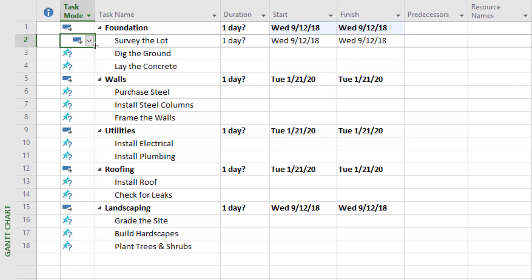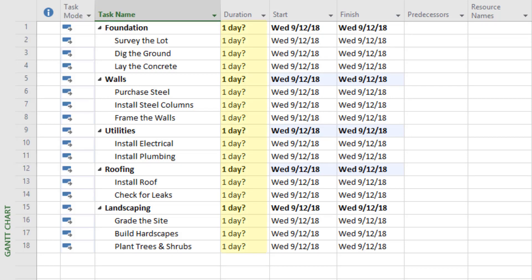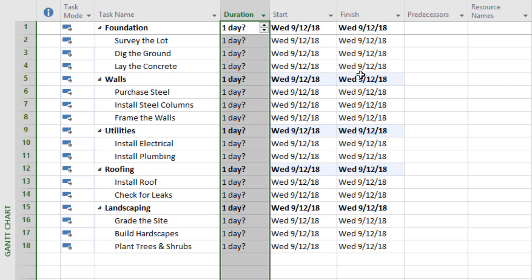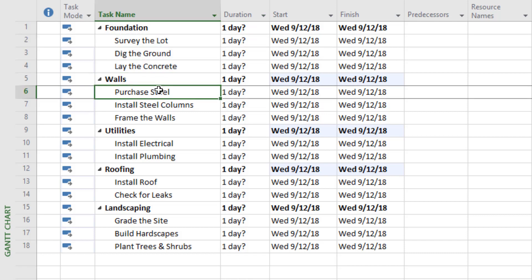Once we select it for one, we can drag and drop it down our list of activities. Now we're going to set the durations for our activities — how long we expect these things to take. As you come up with estimates, try not to do it on your own; involve the project team members, the people actually doing the work, and get their expert input. We're only going to record durations for the lowest-level activities, those not in bold — the categories themselves are just a way to group work.